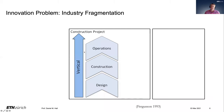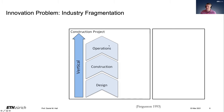Vertical fragmentation means you have a certain set of companies that design the project — the architects and engineers — then another set of companies that construct the project — the construction managers, general contractors, and suppliers — and then a third set of people that will operate the project when it's done: the building owners, maintenance, and equipment managers. The incentive in this vertical fragmentation is to optimize your own stage, not necessarily the life cycle costs.